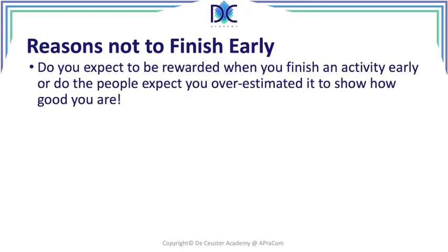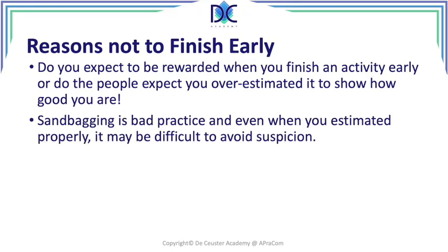When people think that they expect to be rewarded, don't expect a reward when you finish early. Sometimes people will look at you as if you overestimated and you showed it: okay, I overestimated the activity, I will finish it faster, so I can say, hey, I'm good, look at me, I finished it early. Sandbagging, what we call this, is bad practice.